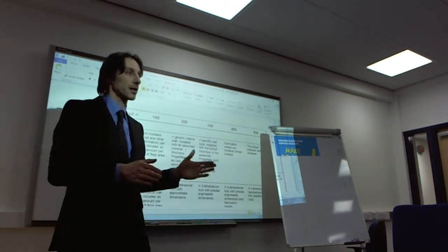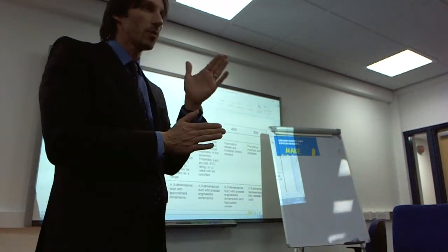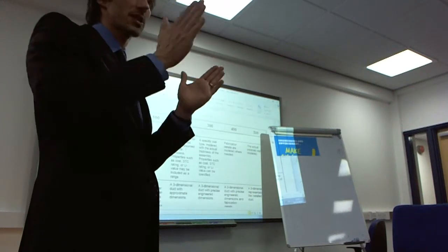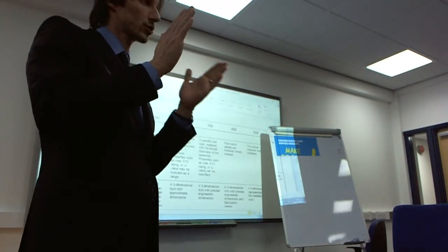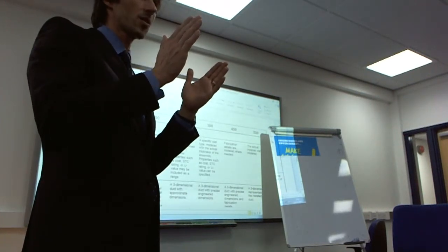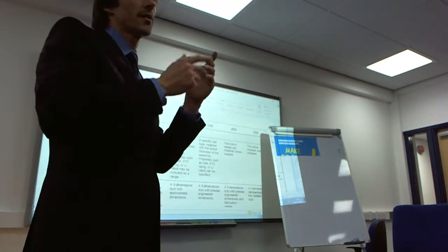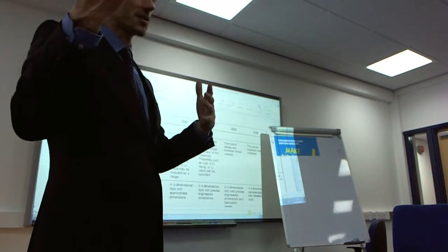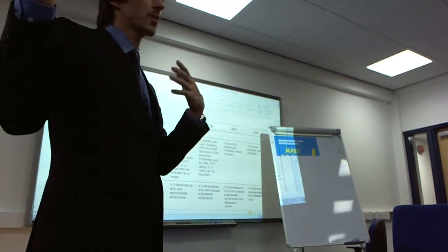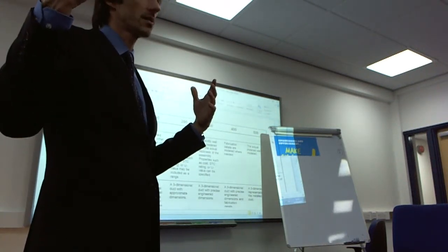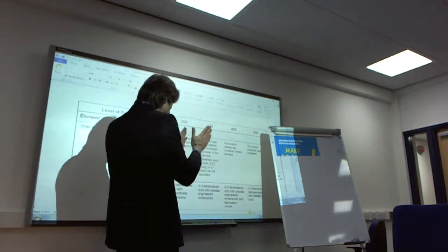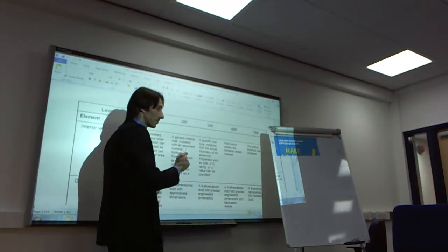So you start saying, well, at this point you must tell me what is the price range that is expected from a contractual perspective. So each wall will be from 50 to 60 pounds per square meter. Okay? So you start thinking of a kind of precision.